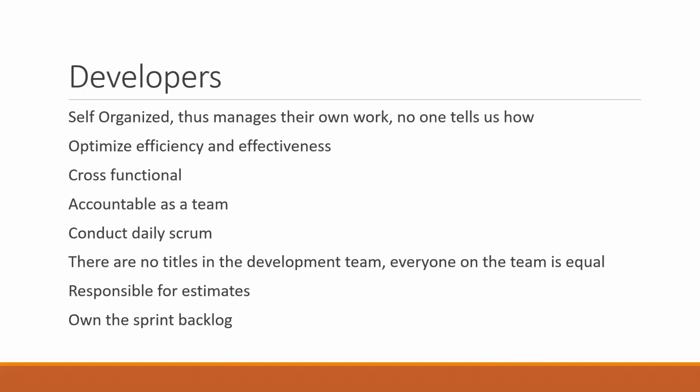So it all depends on the environment you're in. If you're running a SAFe shop, that means you have to do a PI planning for probably the next 3 months. But if you're doing release, it might be the 6 months. It depends on how many iterations or sprints it's going to take to actually accomplish that specific project. That's what I'm trying to say.